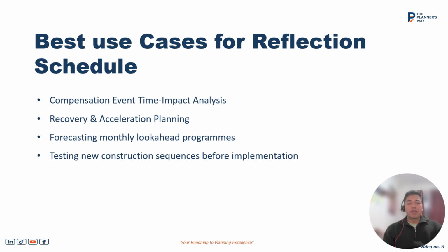Sometimes during recovery and acceleration planning, that means any mitigation strategies, we can use the reflection schedule. Any forecasting monthly look-ahead program, if needed by the client or any stakeholders, we can use the reflection schedule. Any new construction sequences, any changes or amendments in the logic we want to look around or play around with, we can use the reflection schedule. And many more. In general, the best use of the reflection schedule is if we want to see any impact prior to approval.